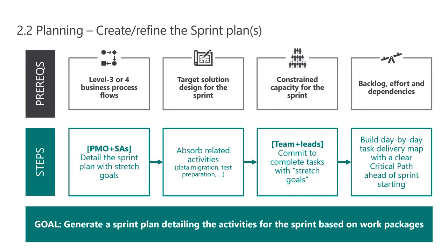If you're delivering something that's very standard, it's a standard configuration, it's very well understood within that industry, don't try and draft the process any further down. It doesn't help you, right? Make sure that the solution design, you've got the target solution design for that sprint before you start the sprint. And that, again, doesn't mean you know the answer to everything, but it means you've got an overview. You know roughly how that's going to get delivered.